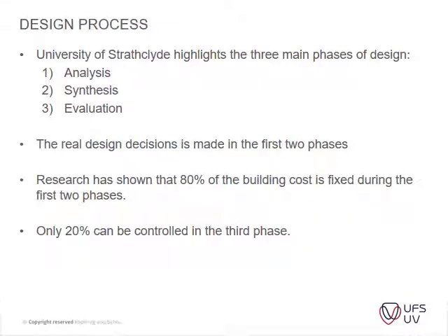Then your design process. Usually you have your analysis, your synthesis, and your evaluation. So you've got your analysis of what the need is. You try and make it material, and then you evaluate it. Will this actually fit within the budget? The real design decision is made in the first two phases of the project. Research has shown that 80% of the cost of the building is usually made up in these two phases. Only 20% can be controlled in the last third of the project.